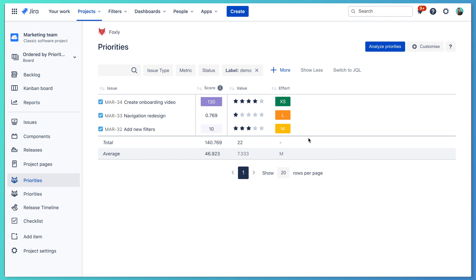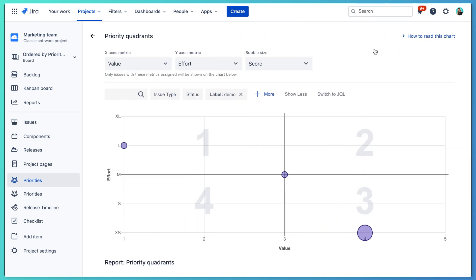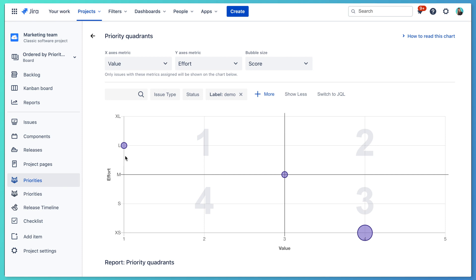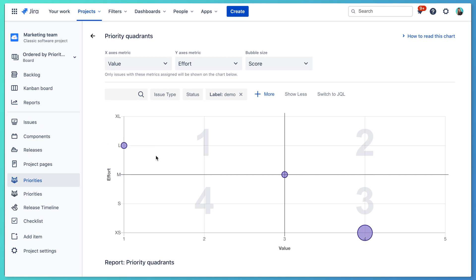Now when we've assigned all metrics, we can order our backlog by tasks with the highest priority and see which tasks are more important to start with. You can also use the priority matrix to identify quick wins — tasks with highest value and lowest effort — and time sinks, tasks with lowest value and highest effort.